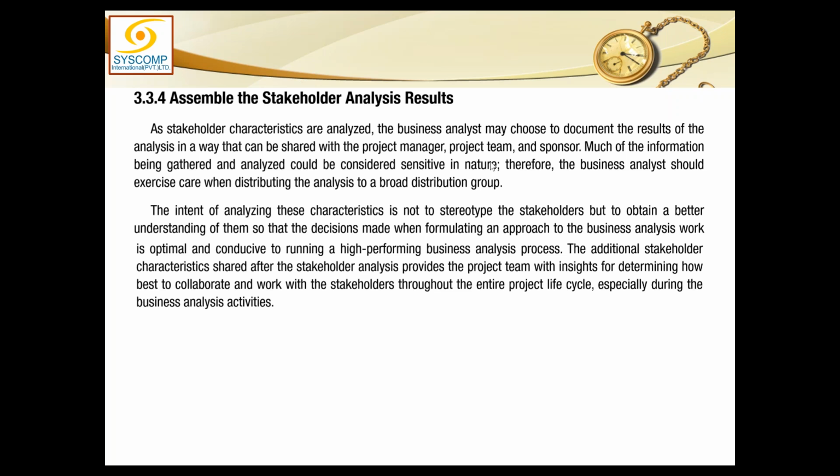It is also mentioned that it cannot be shared with everyone. So to resolve that issue, because how you want to deal with each stakeholder is your strategy, and yet you might not like to share this information with everyone. Therefore, we may separate this document, this management strategy, from the stakeholder register and keep it restricted, or even if it is a part of the stakeholder register, we can restrict the stakeholder register to be only shared with people allowed.